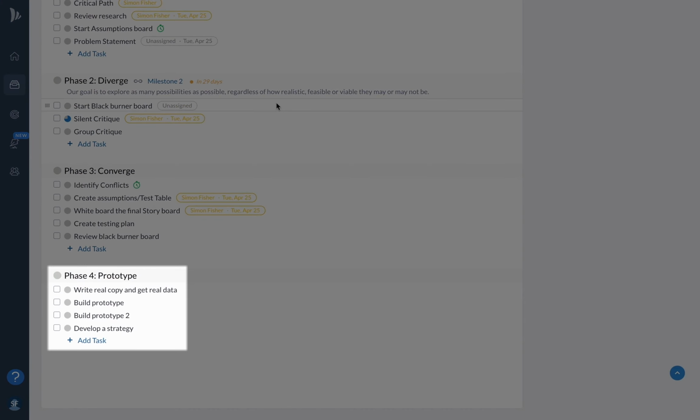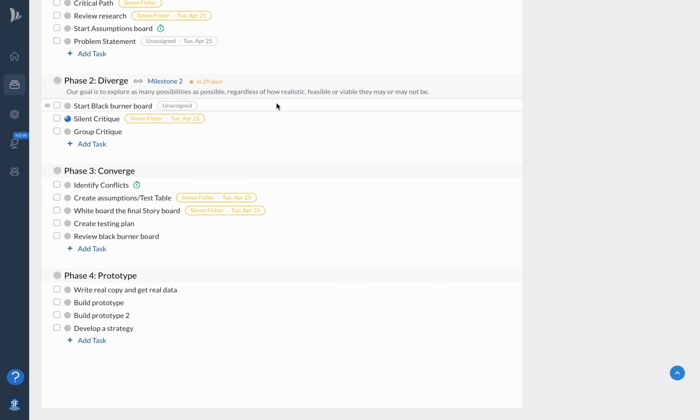And voila! Your task list and tasks will be added to your project. A couple of things to keep in mind. You can't add tasks to an existing task list in your project using this method. And remember that the smart email address is unique to each project and can be accessed by all members of the project. And that's it. Now you know how to add task lists and tasks via email.